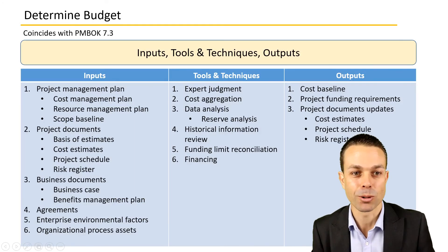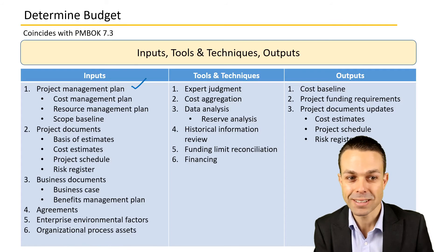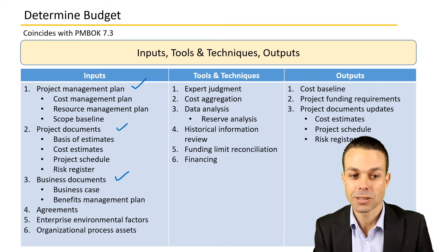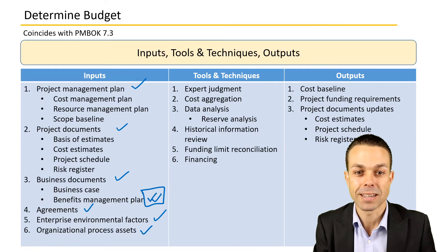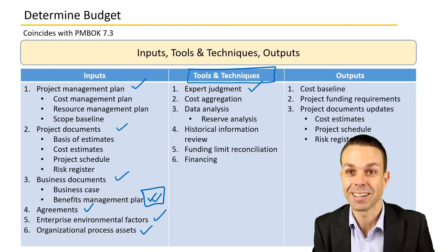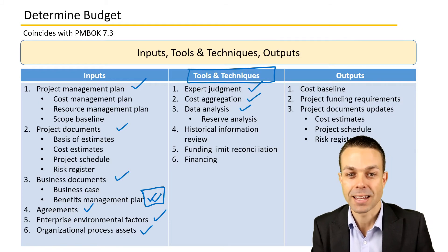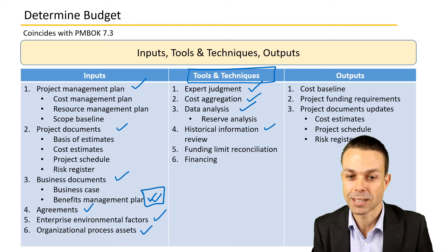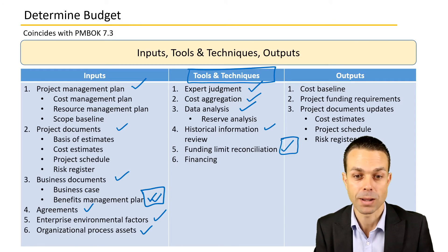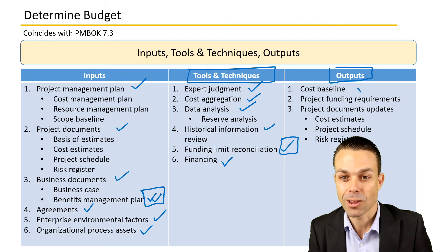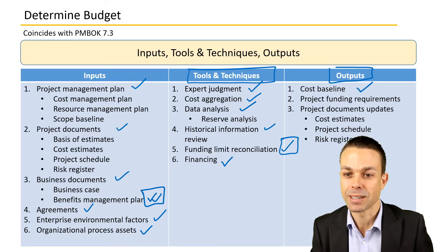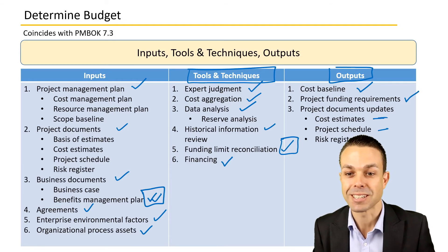Inputs, tools and techniques, and outputs for determining the budget: we've got the project management plan and its different parts, project documents, business documents such as the business case and benefits management plan, agreements that have been made, enterprise environmental factors, and organizational process assets and templates. Tools and techniques include expert judgment, cost aggregation, data analysis, historical information review, funding limit reconciliation, and financing. Outputs include the cost baseline, project funding requirements, and project document updates like cost estimates, the project schedule, and the risk register.